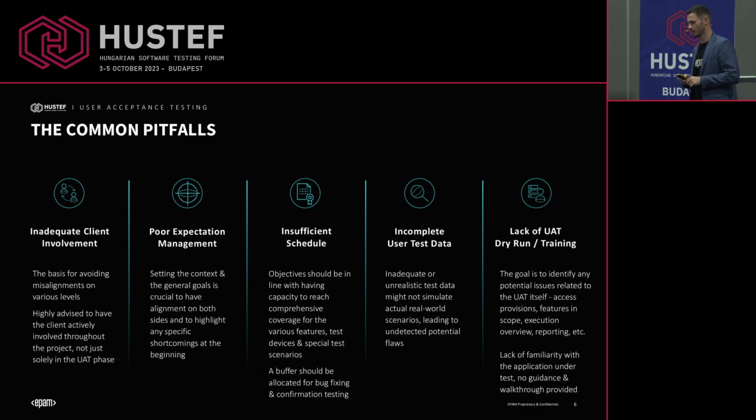The fourth one here is also a favorite one, the frequently encountered problem, the completeness of test data. During the development process, we believe that we are testing the application, it works well, we are confident, so we can have a few beers at the end of the day. But then when it comes to the UAT, it turns out that some real-world scenarios are missed by the team, and it can be a huge problem. So it's advised to work with the client.